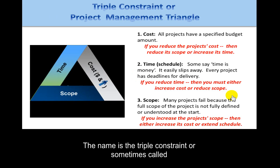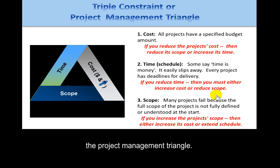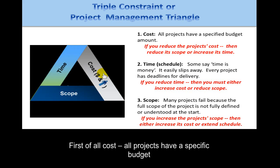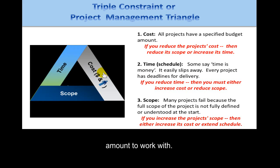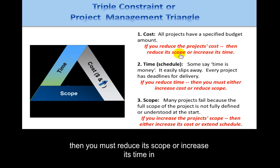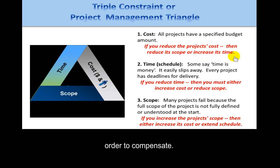The name is the Triple Constraint, sometimes called the Project Management Triangle. It has three components. First, cost — all projects have a specific budget amount to work with. If you reduce the project's cost, then you must reduce its scope or increase its time in order to compensate.